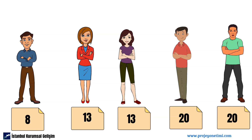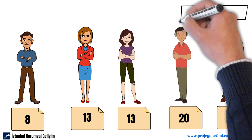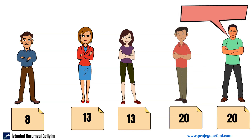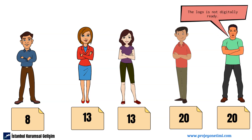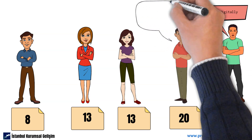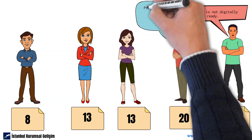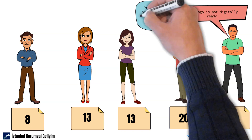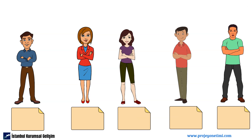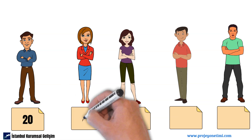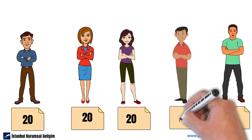After these estimates, team members discuss to determine what the differences between the estimates are. A team member who chose the number 20 says that the logo to be put on the site is not digitally ready and needs to be drawn. Another team member states that professional photography is required for the pictures to be used on the homepage. The other team members admit they did not think about these details, and the team agrees on the number 20 as the difficulty level of the work.